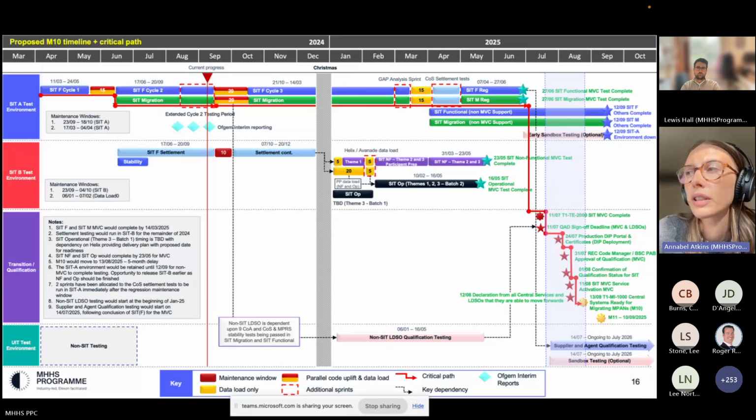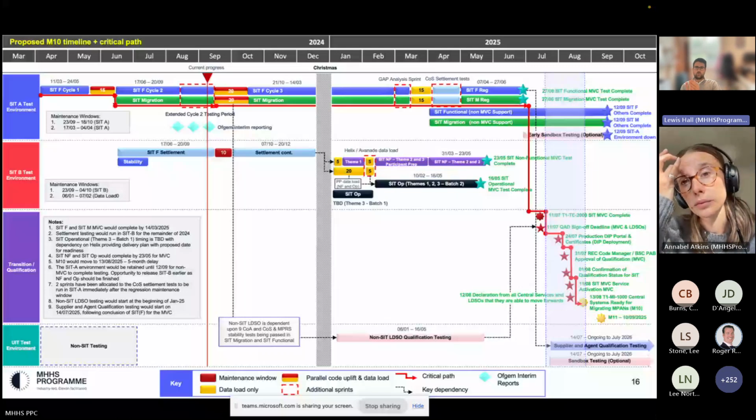Proposed M10 is now on the 13th of August, which is midweek. As this involves major changes to production systems, should this not be over a weekend or at the start of the week? Yeah, so we'll bottom the detail out in the plan. Essentially, the cutover weekend would take place the weekend beforehand, and that's articulated in the M10 M11 cutover plan, which has gone through Torwig and MCAG in recent months. So that choreography of the cutover stands as it's been consulted on. Obviously the dates just changed. So the M10 date here is really the final approval by PSG to say, look, yes, everything has been done as per the cutover plan, and M10 can now be approved effectively. So yes, the cutover activities that would need to take place would take place in the run up to and over the weekend prior.